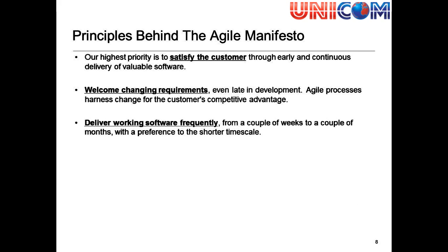Deliver working software frequently, a couple of weeks to a couple of months. My recommendation is around about the 2-week. You should aim for a 2-week sprint cycle. The shorter the better.